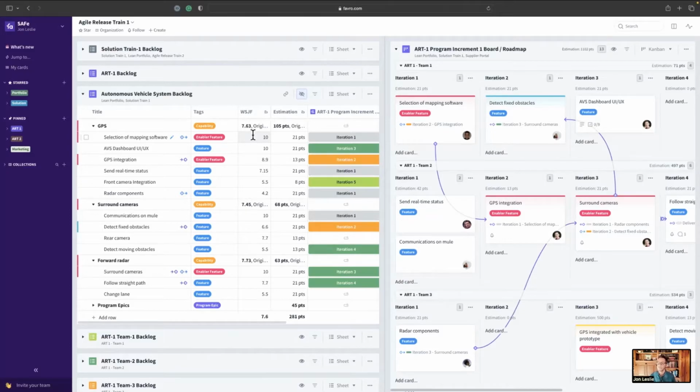So you want each team, as Patrick said, to be as autonomous as possible, meaning that they don't have dependencies on other teams, right? So that's not, of course, always feasible. And that's why a program board is a good technique once you start doing your longer term planning across those teams of teams to see where those dependencies might exist.